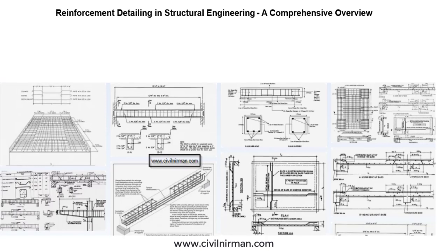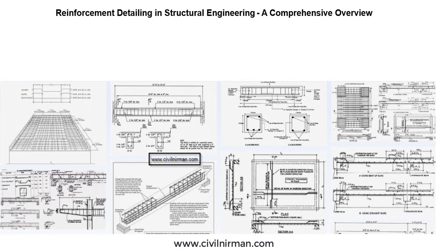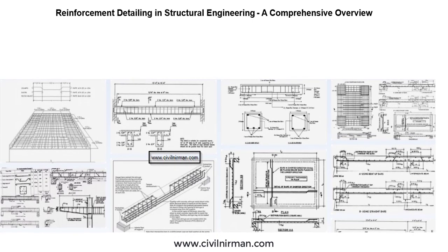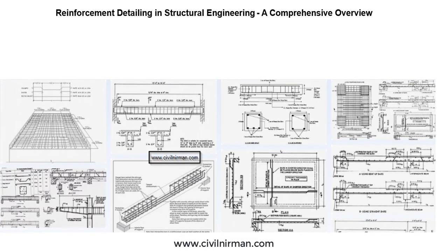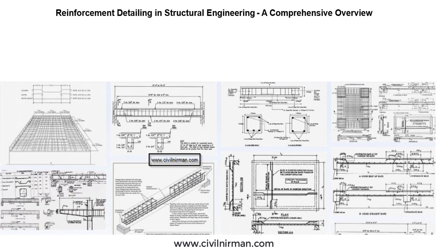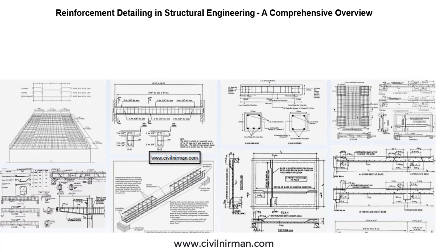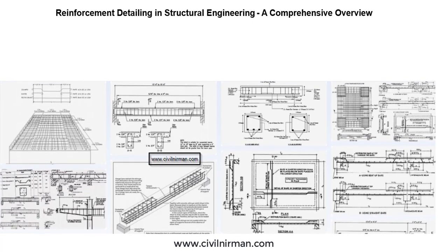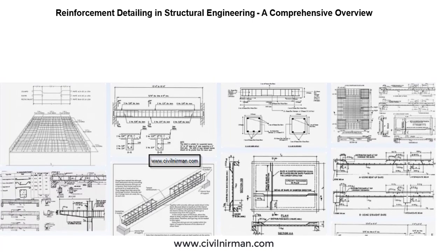Accurate detailing has an important role in the procurement and durability of reinforced concrete structures. The actual process of detailing normally comes relatively late in the procurement process. Concepts and working details can be decided during the early design phases, but preparation of the final reinforcement drawings and schedules is generally squeezed into a period between completion of final design and the start of construction on site.